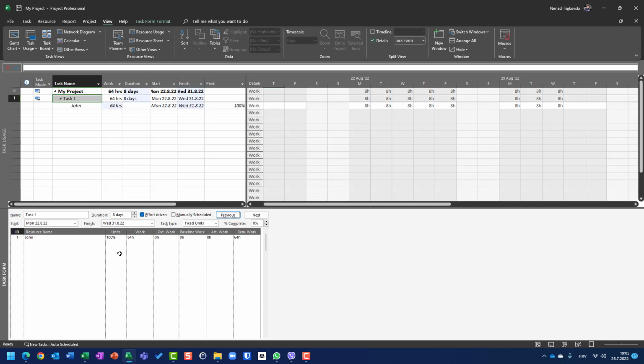Why? Because fixed units means units are fixed, so John is going to work 100%, which means 8 hours per day, so 64 hours divided by 8 hours per day results in 8 days.